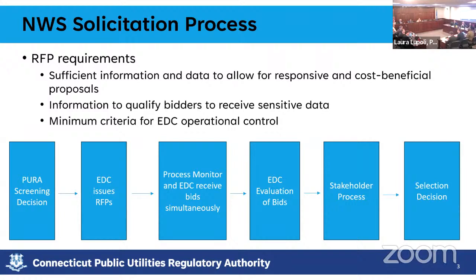I do believe the utilities also included this in their comments. When we talked last time, we discussed the lower cap, like how many dollars and what years should qualify for NWA. We also said there's an upper cap if the deficiency on the system is too large. We proposed the 5 megawatt limit: if the 10-year forecast shows a deficiency larger than 5 megawatts, the process automatically opts for the traditional solution, because any DER or other project solution is very likely to run into issues in the interconnection queue. So that's the upper limit.